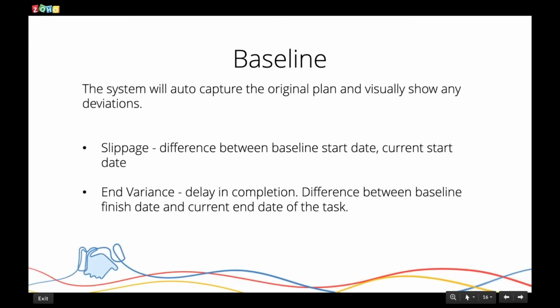This is also on the Gantt chart. So now we're seeing task owner, task completion, we're seeing dependencies, we're seeing critical path, we're seeing slack. Let's add one more, the baseline. The baseline is your original plan. It is when you first created that project plan, and you need to know, how close are you to that original design? So in gray, it will outline your original design, because in reality, things get delayed, people get sick, people aren't there, things have to get reassigned. So as things move around the project, maybe you want to see it on top of the original plan, so you can see, okay, there's this much variance going on from my original plan.